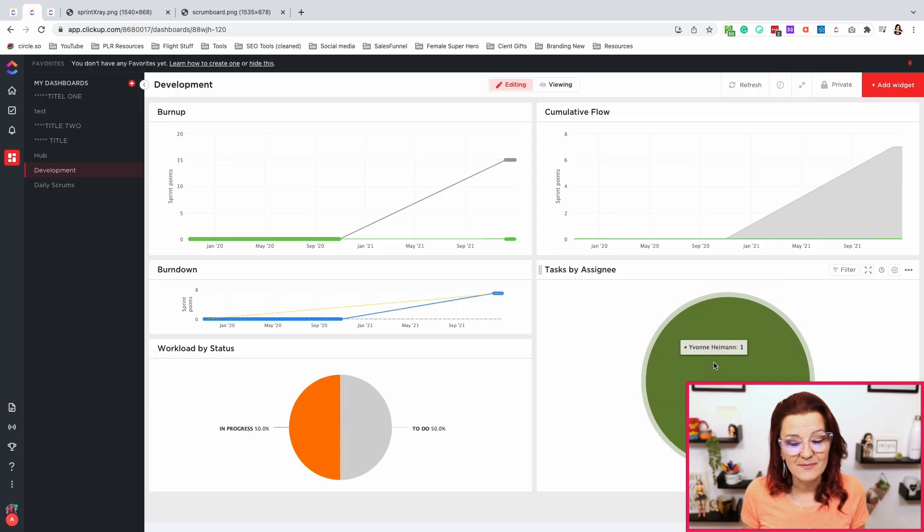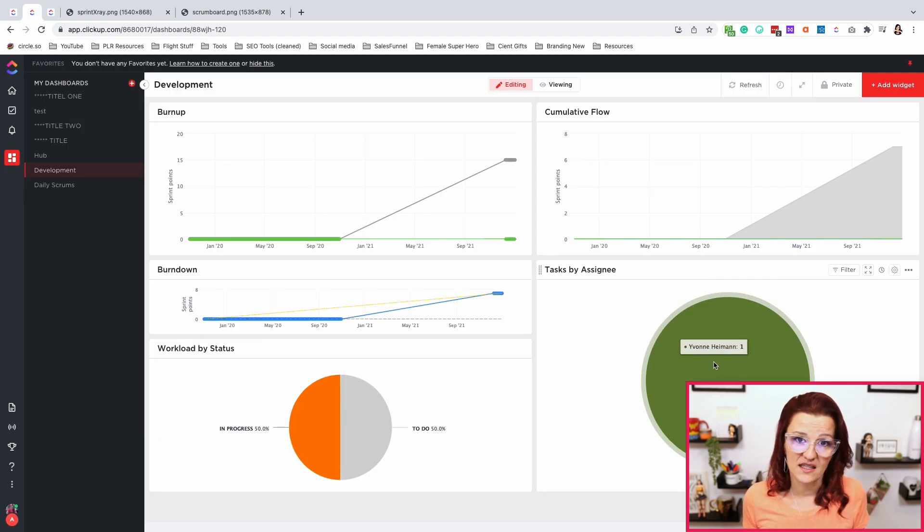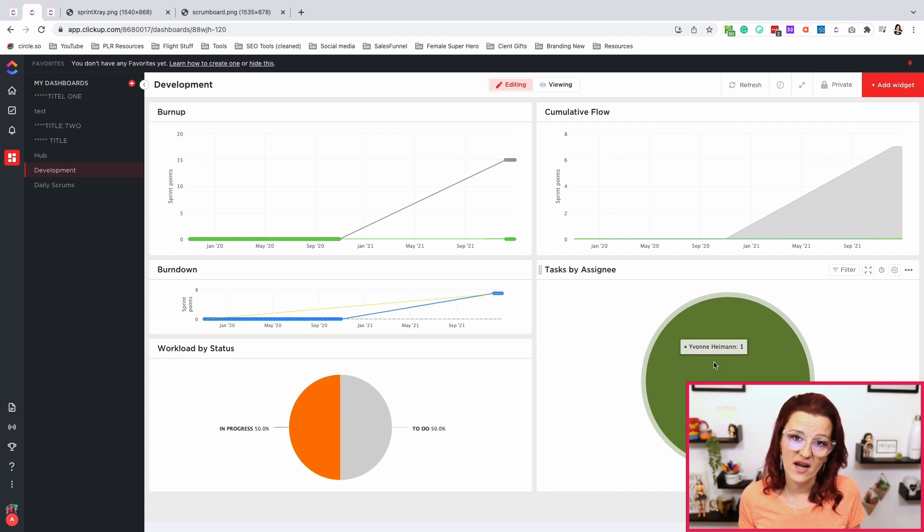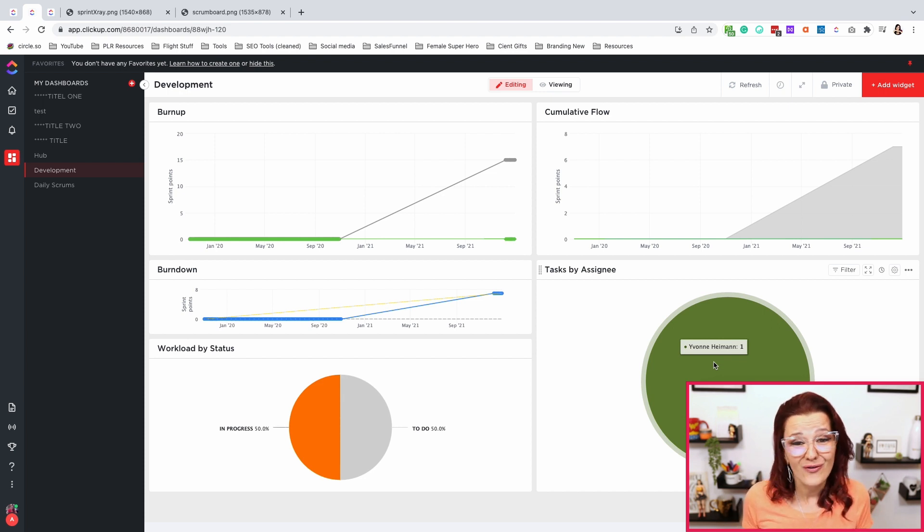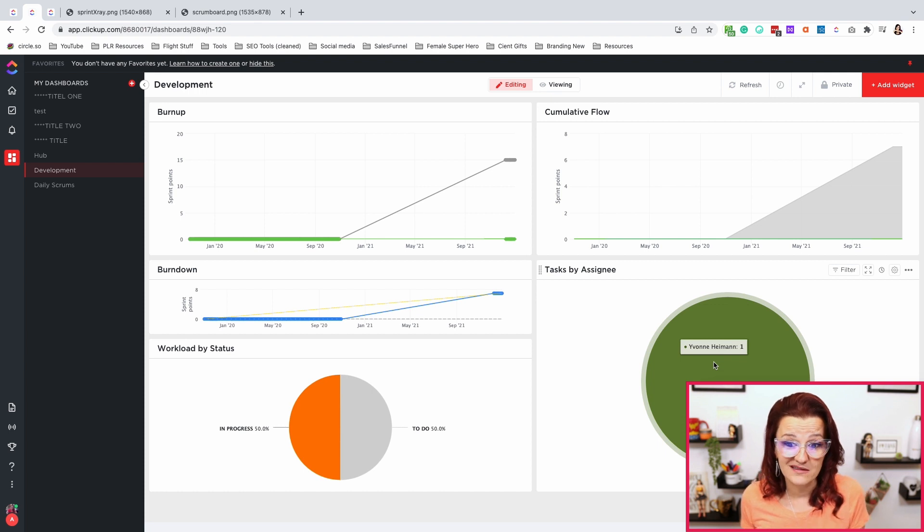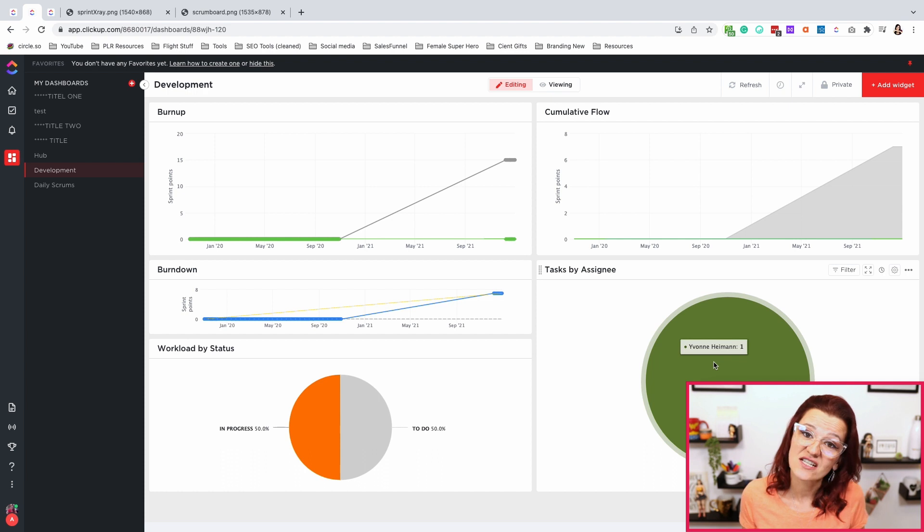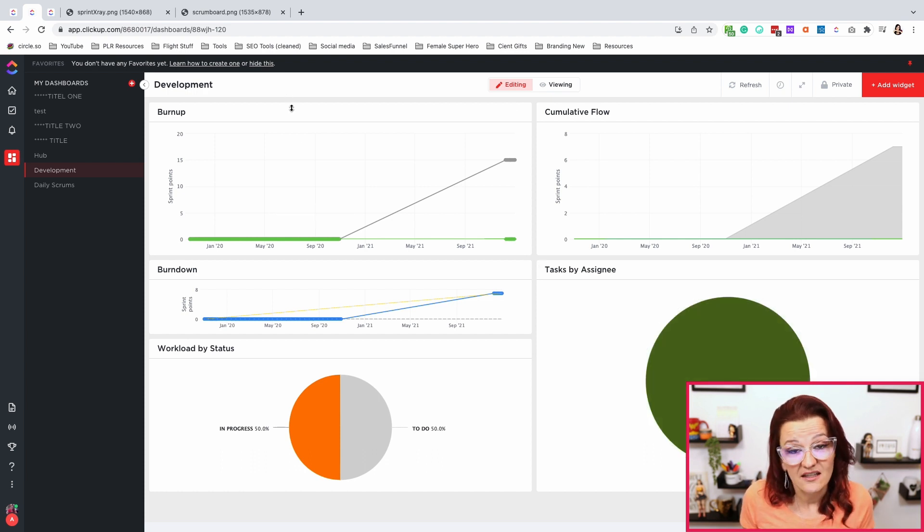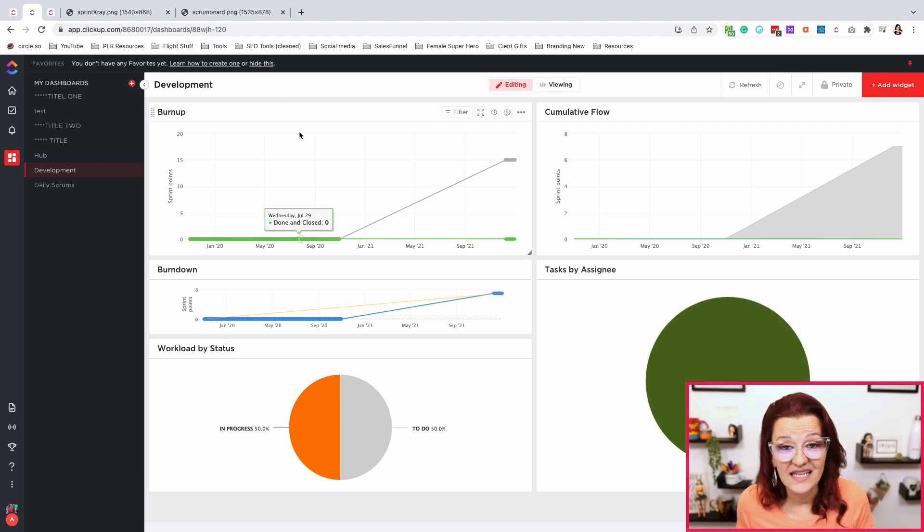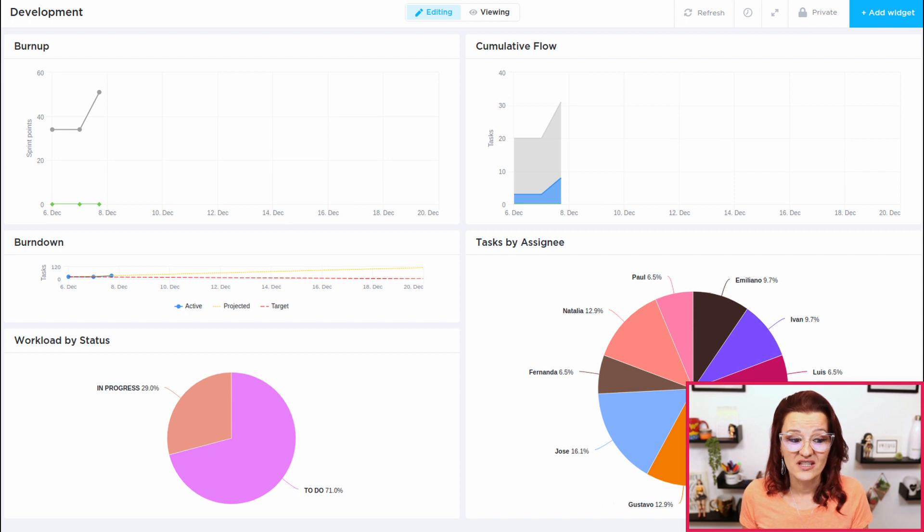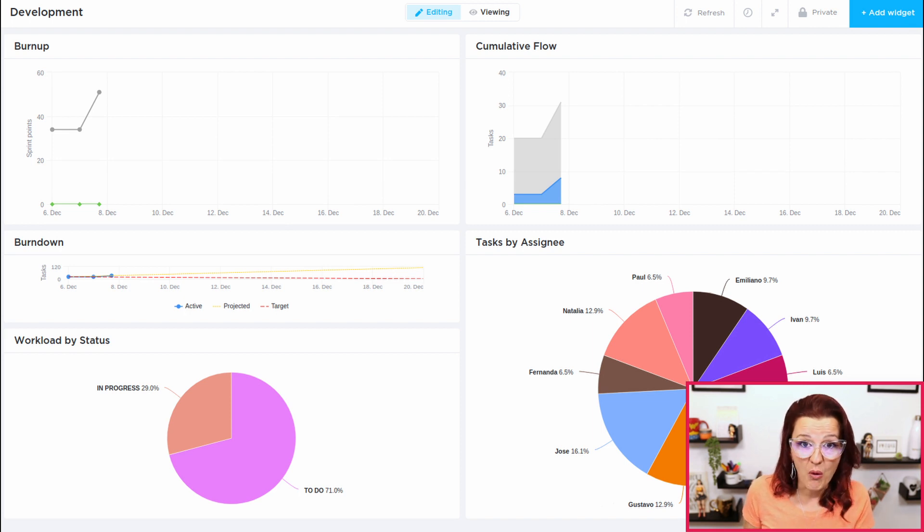And then last but not least, task by assignee for you to be able to really pay attention to how you have spread out the work. Maybe you overloaded somebody with work. Maybe somebody doesn't have enough to do and you actually can hand off a couple of things. And then if you are not in a sandbox, it would actually be looking something more like this.